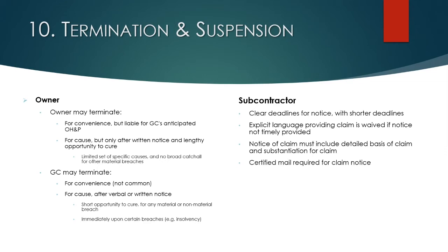You should require the owner to provide you with written notice and a lengthy opportunity to cure. So whatever the owner thinks you've done wrong, the owner needs to explain that to you in a formal writing, and you should be given a lengthy, reasonable amount of time to cure it.